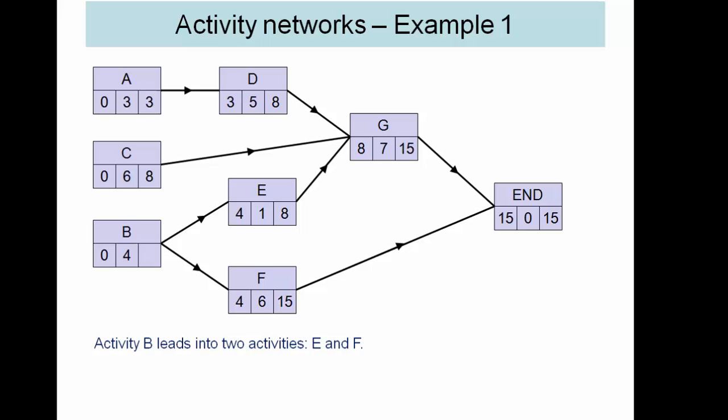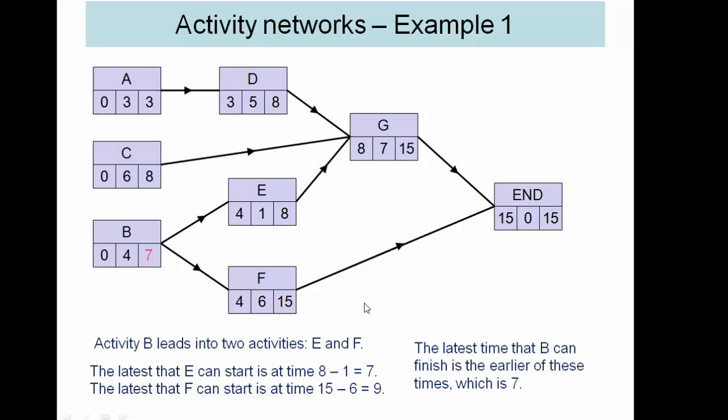Right, B is slightly different because it leads into both E and F. So eight minus one gives us seven for E, but then 15 minus six gives us nine for F. So we can see here on this occasion we have to take the earliest of the late times since we want to avoid delaying the project. And if we waited till nine we would delay the start of E by two.